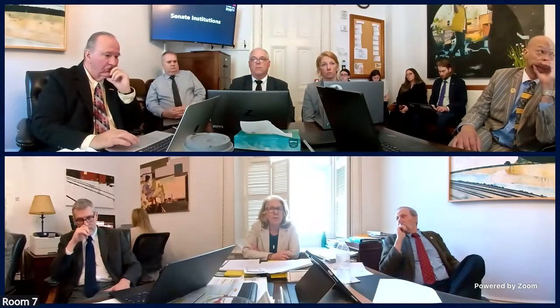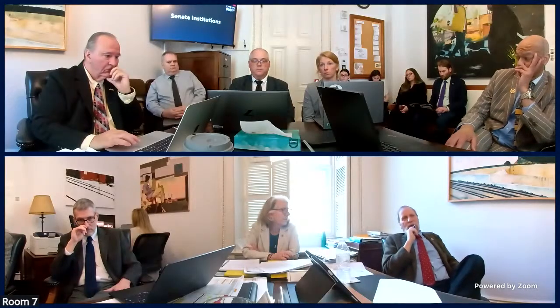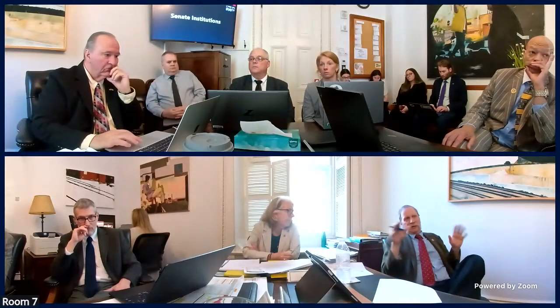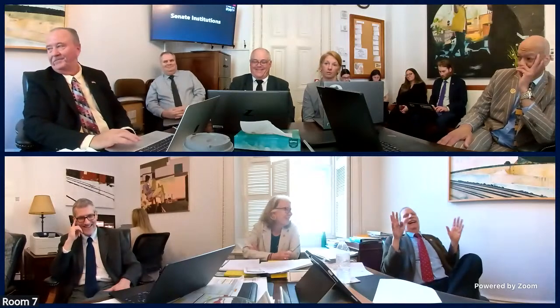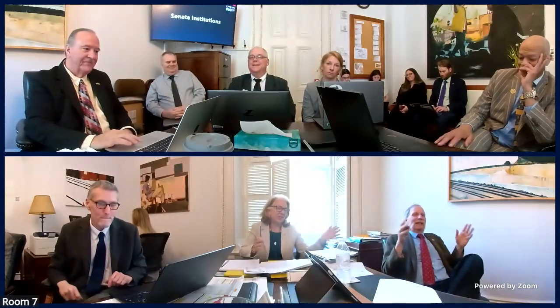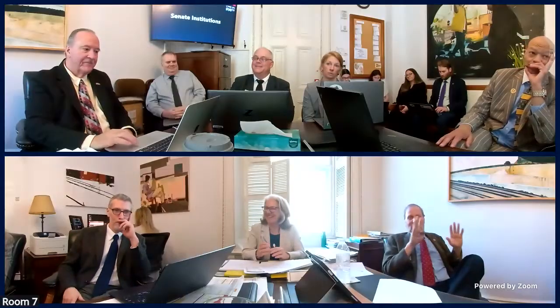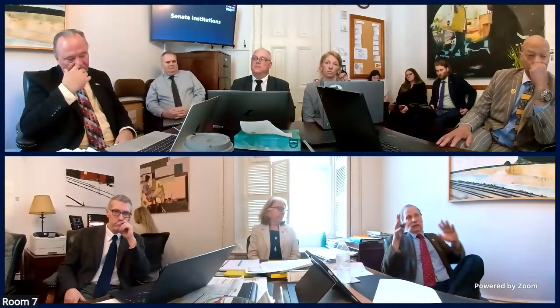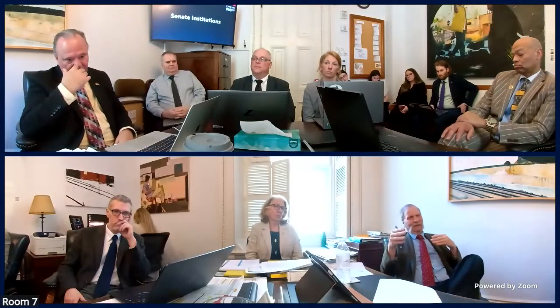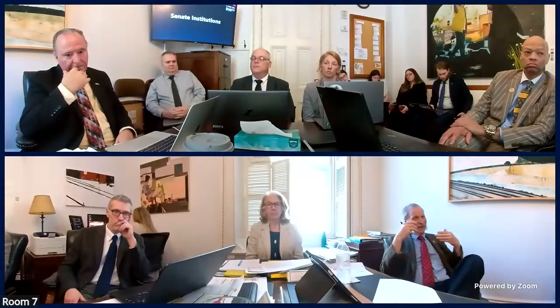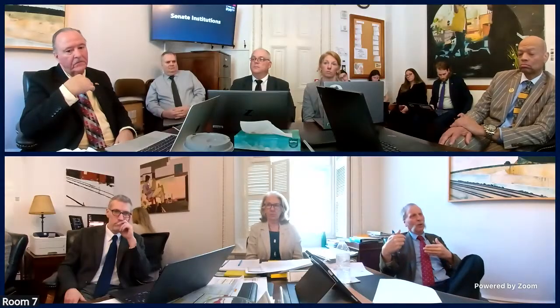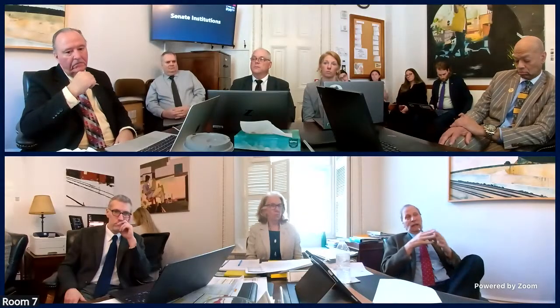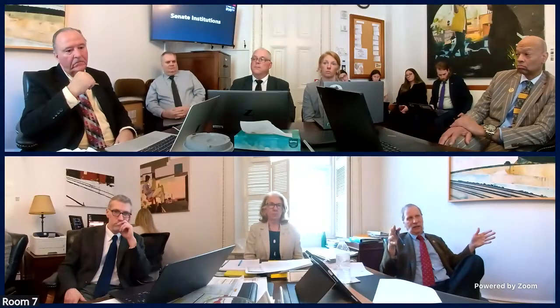So you can put this in writing for us, right? Not playing engineer, but it's hard. If we, again, I'm just trying to make sure everybody clearly understands: theoretically, you could move forward building, leaving the end wall off, so to speak, and then come back later and put the boilers in. It would mean about a year's delay in the project, though.